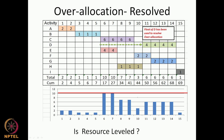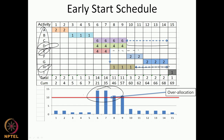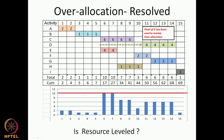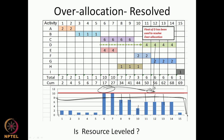What we had done in the earlier case was move from a scenario where resources were in excess of what was available, and we were able to level it to a scenario where we did not have any overallocation. So in some ways we have done some kind of leveling, but is this all there is to leveling? The answer is no — you can see the resource profile still has variation. How can we bring this to as level a profile as possible?